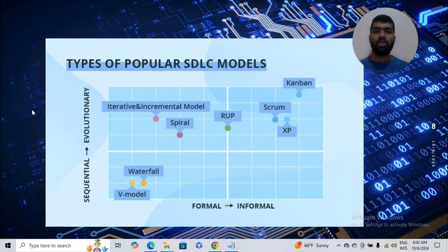One of the most used agile methodologies is Scrum, which is probably the most popular one. The iterations, which are called sprints, are usually 2 to 4 weeks long, and they are preceded by thorough planning and previous sprint assessment. No changes are allowed after the sprint activity has been defined. In agile methodology, there are also some other models that are used, such as XP, which is extreme programming, and Kanban, but the most popular one is Scrum.